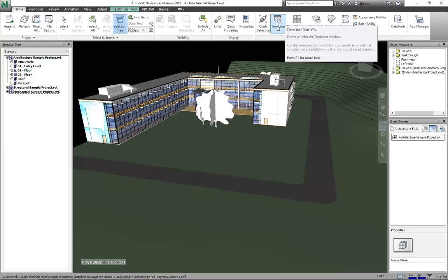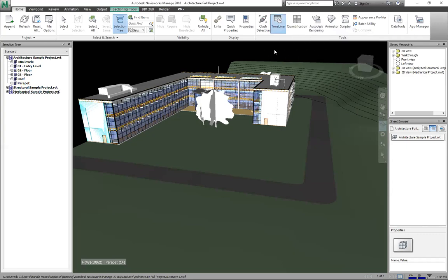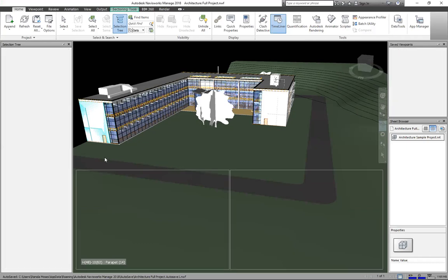A lot of us will be used to work breakdown structure, where we have the start of the project, the end of it, and every component, probably the ground floor starts today, ends in 2 months' time, first floor starts next month, and a lot of that. So timelining also does that, but with a model. So it sort of creates a realistic explanation of the project progress.